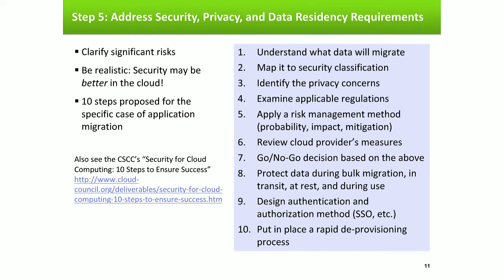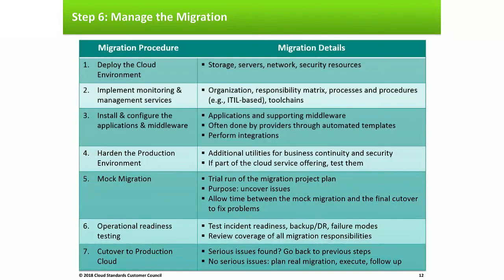So once you have the whys, whats, and hows of the application, you need to start the migration process, a business plan, and a detailed migration plan, which is basically the critical success factor. To develop the plan, you may need to consider pre-migration, migration, and post-migration tasks and tests.